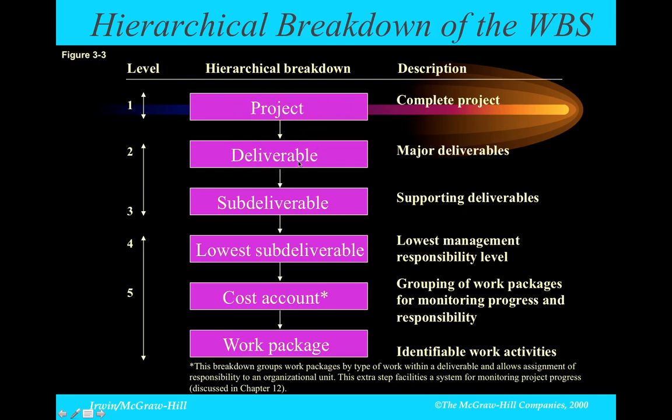Here's the overall project. And if we could identify all the major deliverables, what needs to be produced, and then for each deliverable, if there are sub-deliverables and then other levels of deliverables, you can go as many levels as you want, depending on the amount of detail you require. And then if we could assign some of these sub-deliverables to cost accounts so that we are able to kind of monitor the costs associated with parts of the project.